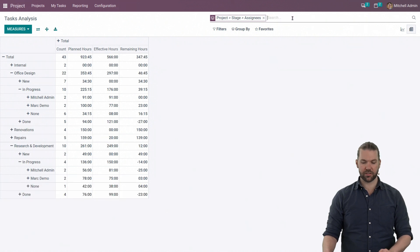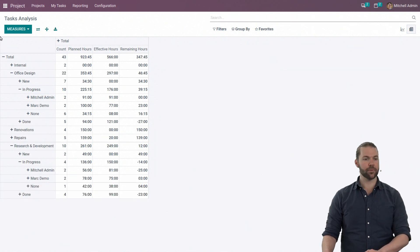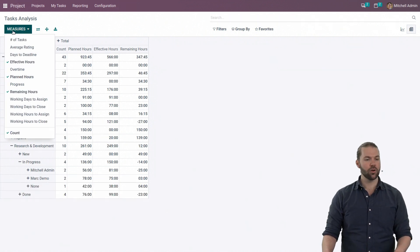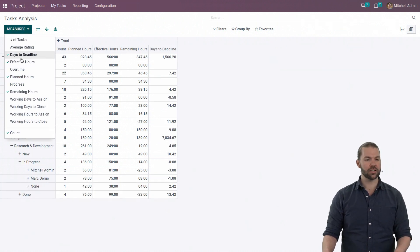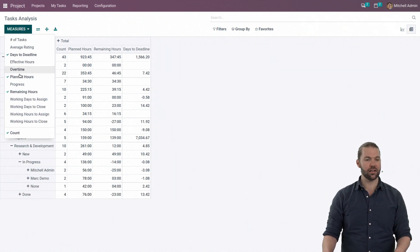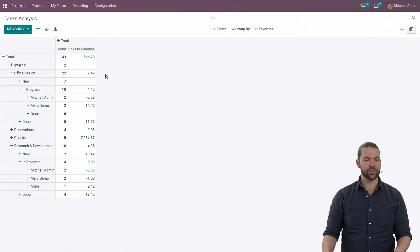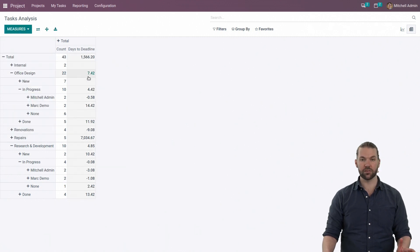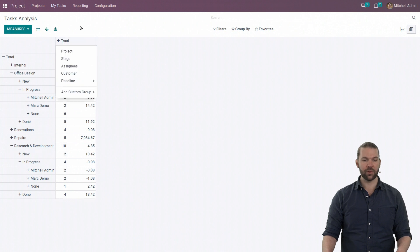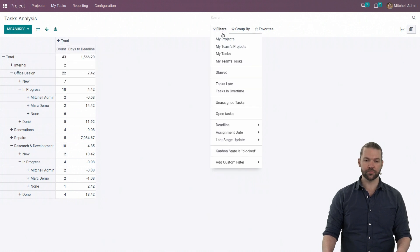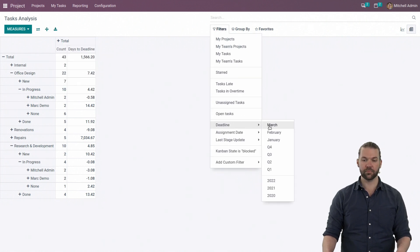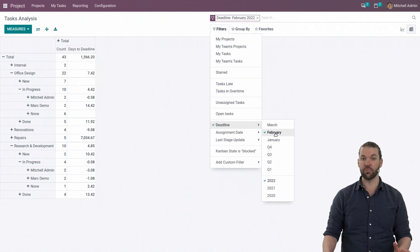Now, going back to the measures, we can also look at days to deadline. These are how many days we are away from the deadline that we need to reach. Then we can add a filter for the exact deadline. Maybe let's look at February.